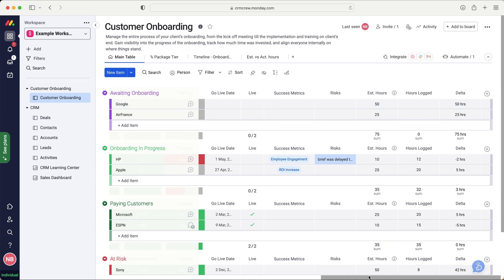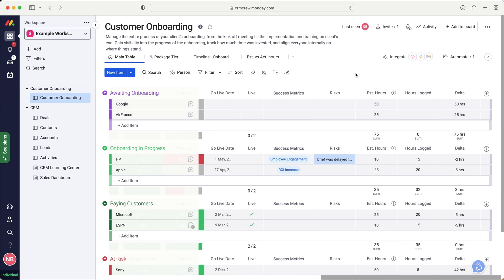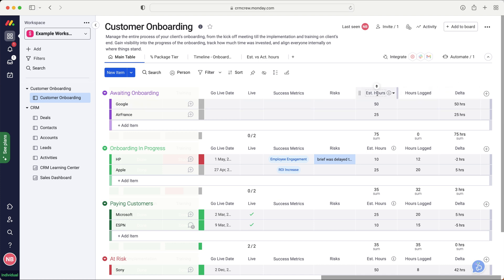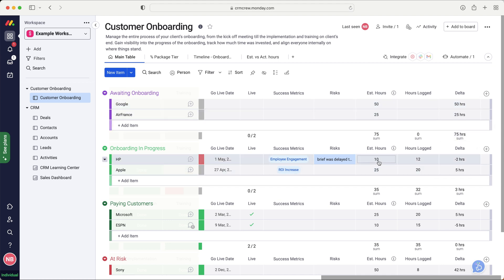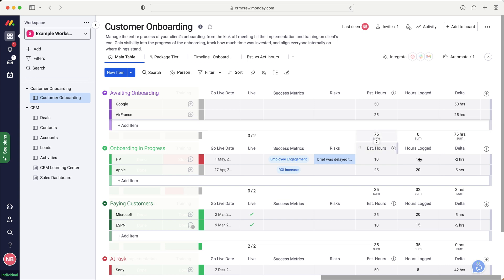Now, I really like this final piece here, which is estimated hours, hours logged, and then delta, which is how many hours do you think it's going to take? How many hours have you logged and how many have you got left? So you can see here, they estimated 10 hours. It's taken 12. So they are minus two hours. So they are in a deficit for that particular onboarding or a surplus, depending how you look at it. But that's quite a neat little feature there.